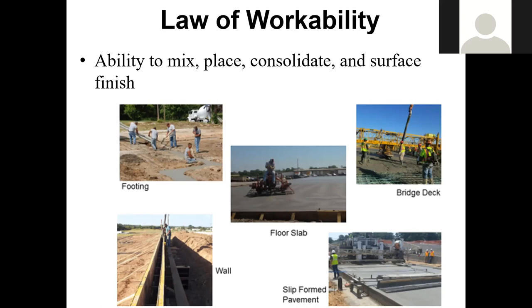Whenever I'm going out and pouring concrete, I want that concrete to be a 6-inch slump when it goes to the job site. For this one application, maybe this other one, I need a 2-inch slump. But whatever it is, I need that. I don't want to wait around while you mix your truck up. Time's money, in my opinion. I'm paying these guys to go out there and finish and place that concrete. I need it now. I don't need to wait for your truck, because your truck's going to back up, then another truck's going to back up, then another. I need this now. And I communicate that.